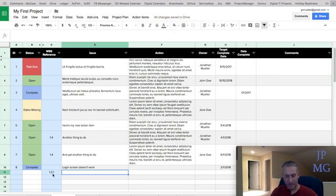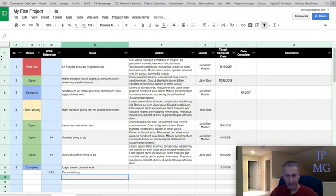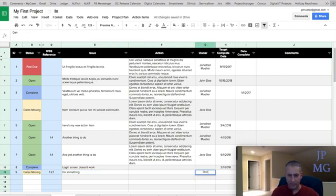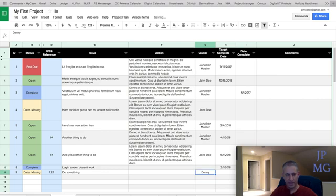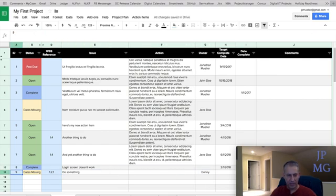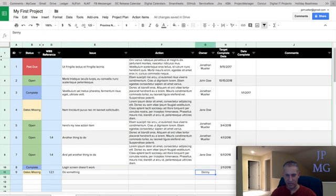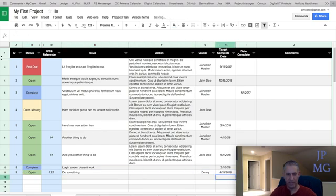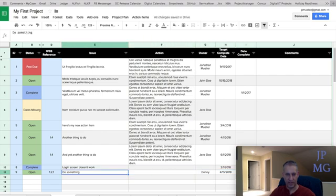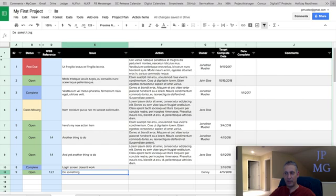And I'm going to say, do something. Whatever it is. I'm going to assign it to Donnie. And now I have the link. It automatically filled out the ID. It automatically tells me the date's missing because I didn't enter a date yet. So let's make that for 4/15. Now it's open. Donnie has something to do. And that's how you create a new action item from the currently selected task.